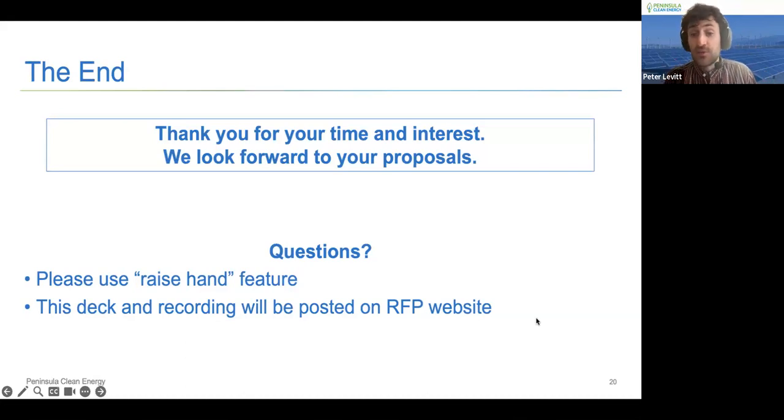Yeah, well, one thing is I do think that our ability to drum up leads was effective. We had 15 projects going into the previous RFP for the last portfolio in round one, and we ended up signing 12 PPAs with 12 different sites and an EPC agreement for the associated capacity with those 12 projects. So if we expect the same level of attrition, then we might end up with maybe 35-ish projects out of the 42 that we have here, which means that we've done a pretty solid job of vetting projects up front. So basically there's merit to that approach.